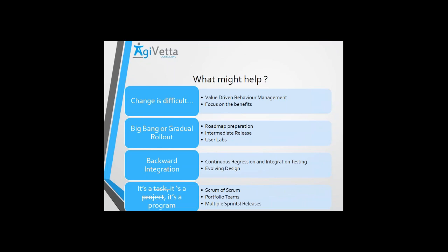Now, Scrum is not the only framework you might be able to use here. When we think agility, agility is way beyond Scrum. You might want to use Kanban, for example, which might help you track the flow of your project, which might help you understand the users first. So one of your features may be in the analysis stage or the insight stage for probably 2 weeks, right? Scrum says you need to have some kind of output every 2 weeks or 4 weeks, as the case might be. So when you are into the R&D, the initial design phase, you may focus more on Kanban.